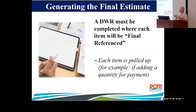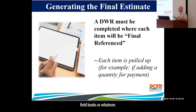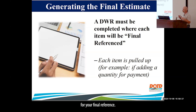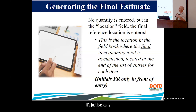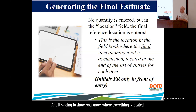If you have spreadsheets — a lot of people go to spreadsheets and get away from the old orange field books — you can just put 'see spreadsheet' on your DWR for your final reference. No quantity is entered on this DWR. Site Manager is going to pull that and put it in our audit workbook showing where everything is located.